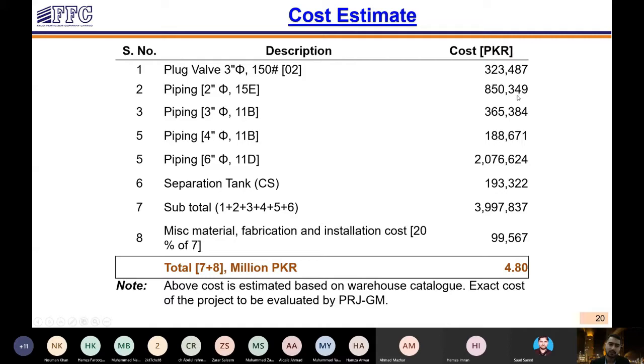The cost numbers are derived based on the procurement that we normally carry out at our plant for different modifications. So we have a pool of cost estimates already available with the latest procurements. We use that data to get the piping cost estimates or equipment estimates.